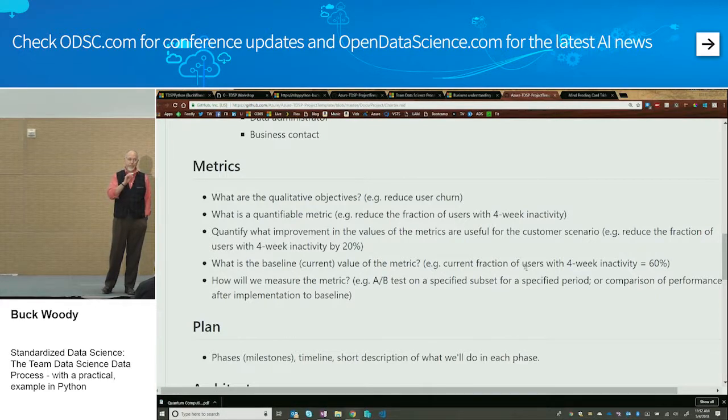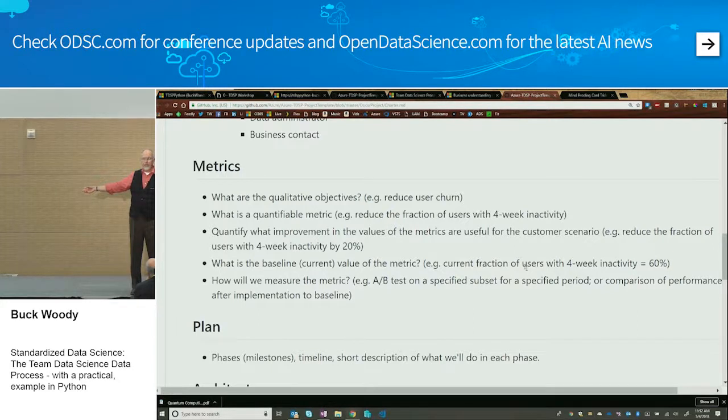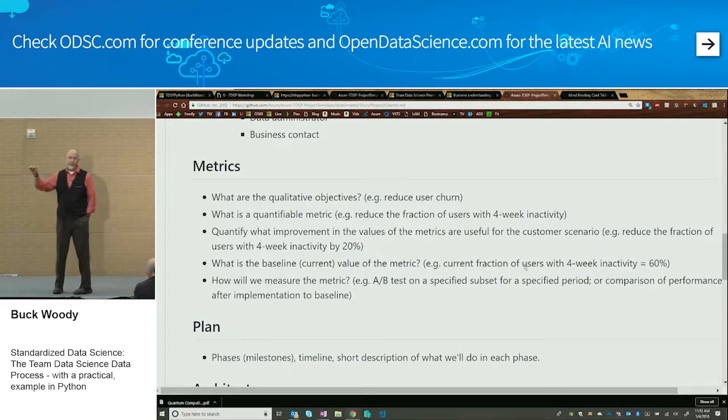Seriously. Go in with an exit strategy because the customer, after you create the database they ask for, will say, oh, that's nice. Can we put pictures in there? Well, we could have, had you mentioned it at the beginning. Well, can we put that in Chinese? Well, I could have if I'd set the code page up like that. I can export everything and redo the whole project. Yeah, let's do that. So make sure you have the success metrics going out. You with me? This is real world pain talking to you.